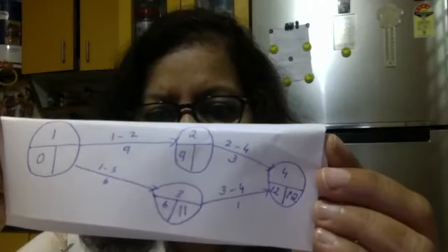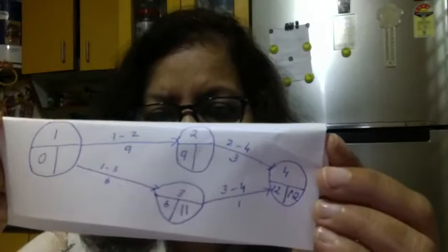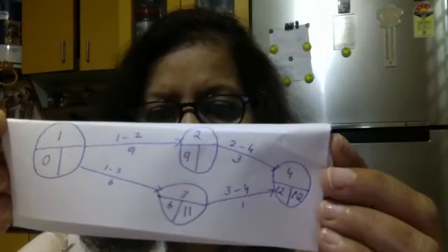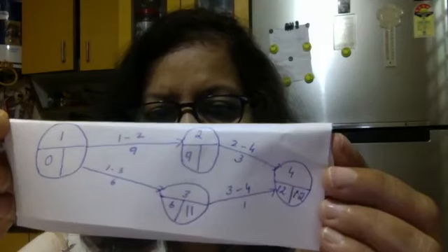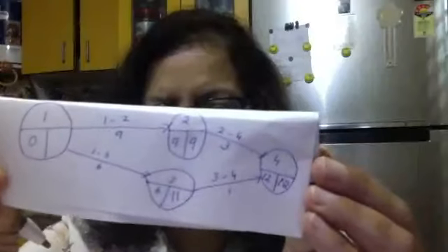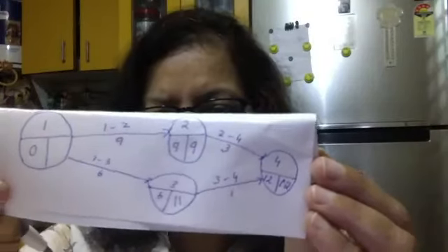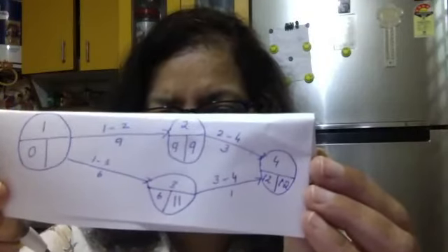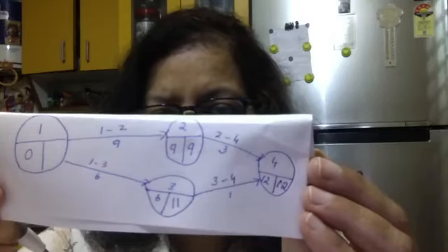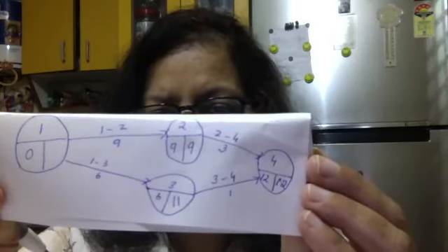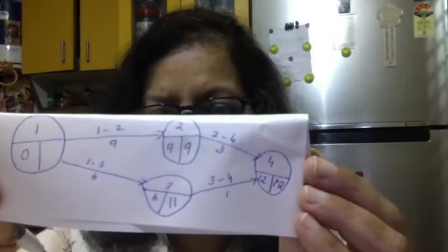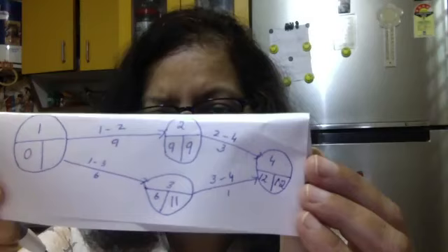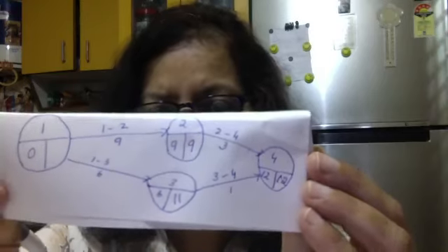Now look at the above arrow. I am doing 4 to 2. 12 minus 3 is 9. I'll put in that column 9. Now class, we have two things. 2 to 1 is 9, and 9 minus 9 we get 0. Is 0 better, or when you come from 3 to 1 you get 5? In decision tree,